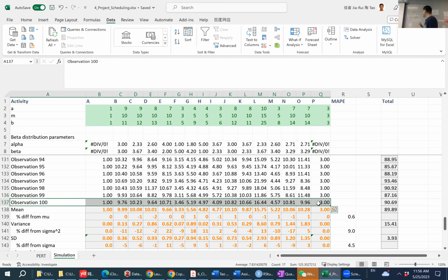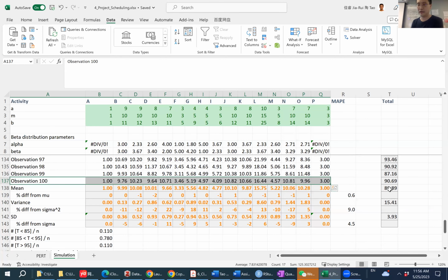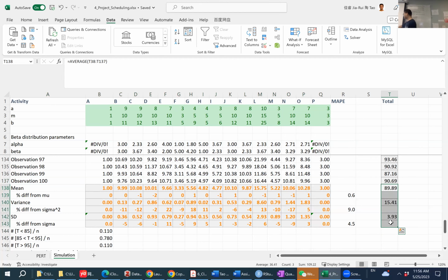The reason for creating so many cases is that if we use the simulated quantities here, there are two sources of errors that come into play. First is because of the sample size. Because I simulated each case using a random number, each random number has a sampling error. The sampling error will be smaller and smaller if we increase the sample size. So that's why we want to increase the sample size.